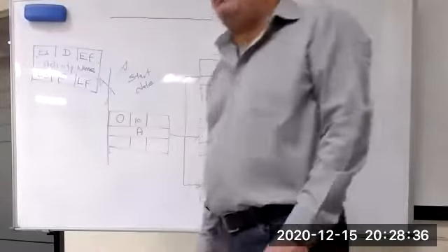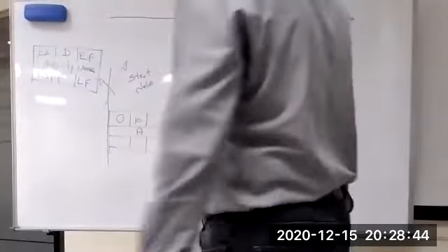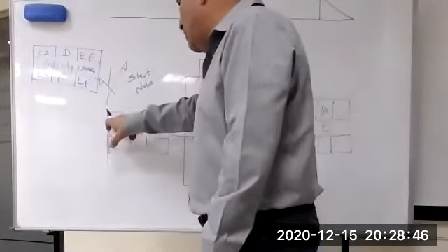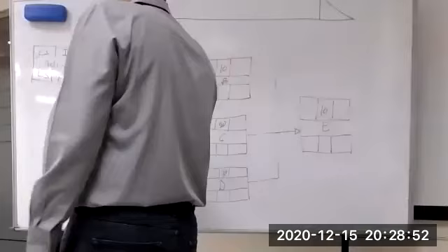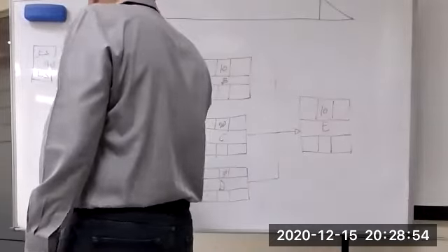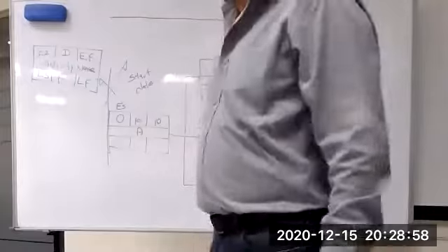In our exam, there is a method we call end of the day duration estimate, referring to the end of the day. What does end of the day mean? Start from 0, 0 plus 10, you add 10. Here is early start for activity A, which starts from 0.